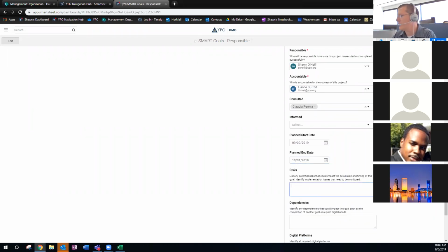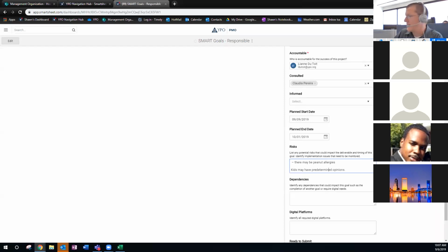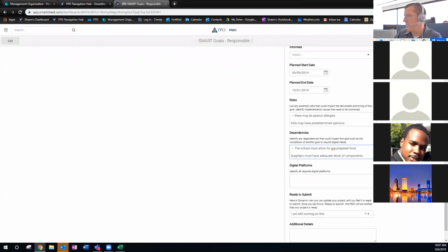Do we have any risks? Sure, we can come up with a couple of risks. So we have what might happen that might impact the project. So there may be peanut allergies for the peanut butter and jelly sandwiches, or kids may have predetermined opinions against our peanut butter and jelly sandwiches. And then we've got dependencies. The school, what are we dependent on? So the school must allow for pre-prepared food, and suppliers must have adequate stock for components. So just things that our project depends on.